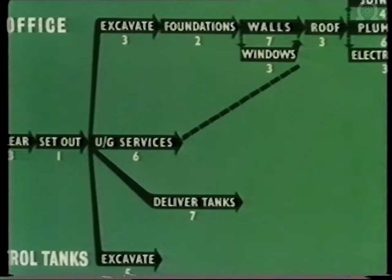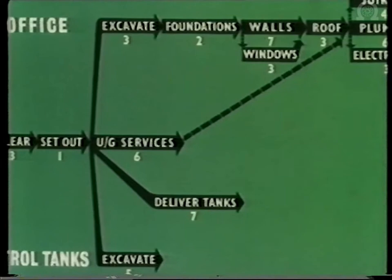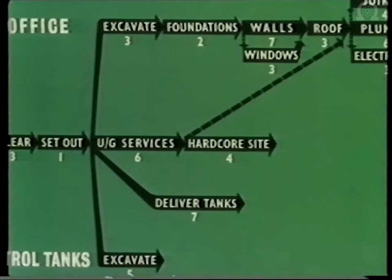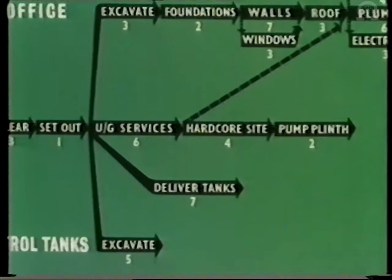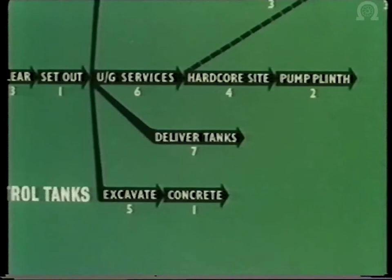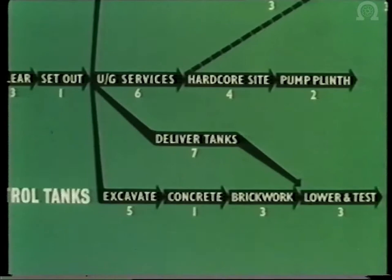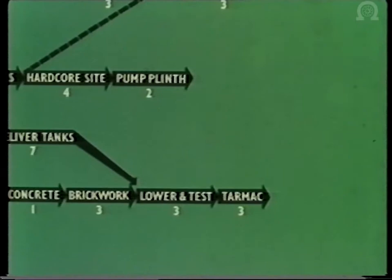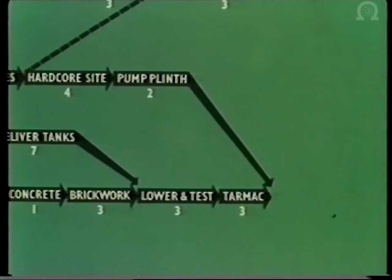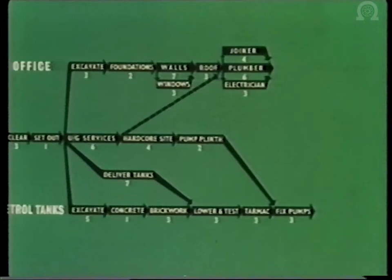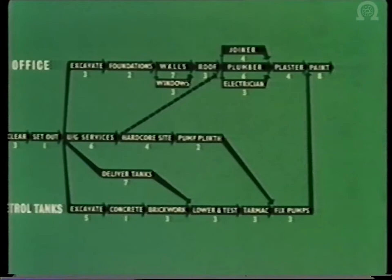Dummies have no time set to them. They are brought into the diagram to show the logical sequence of thought and of events. After the underground services have been finished, the site can be covered with hard core and then the pump plinth constructed. Next, the petrol tanks: after excavation, the bottom can be concreted and the sides bricked up. Now the tanks are ready to be lowered, assuming that they were delivered on time. The next job is to tarmac the site. By this time, the pump plinth should have been finished and then the pumps can be fixed. The job is well ahead now and when all the services have been completed in the office, the plasterers can get to work. By now, the pumps should have been fixed. The whole job must be painted and then it will take a few days to clean out the site.